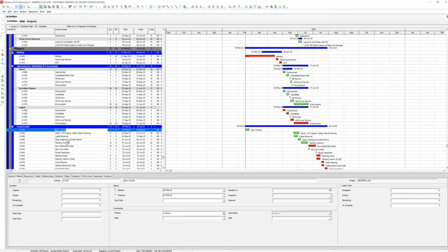It's probably gonna help a little bit on the schedule. Light install. Okay, so we just have one activity for lights. And you know how your electrical, you had 10 days? Lights, maybe the lights is only 5 days, right? So I'm gonna type procurement of lights to that light, F9 it.